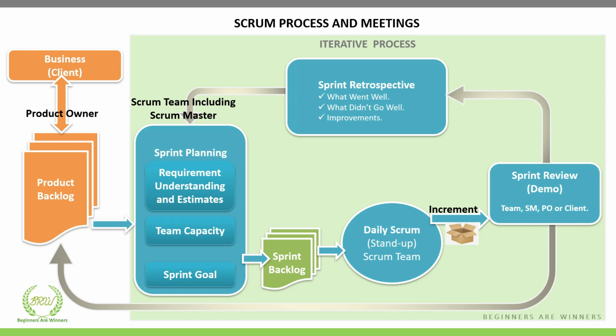Now the project team works iteratively to deliver value through each sprint, as shown in this picture, wherein each sprint comprises 2 to 4 weeks of duration. The whole team decides the duration to be either 2 weeks, 3 weeks, or maybe 4 weeks, which depends on the delivery needs, work complexity, or any other internal or external factors.